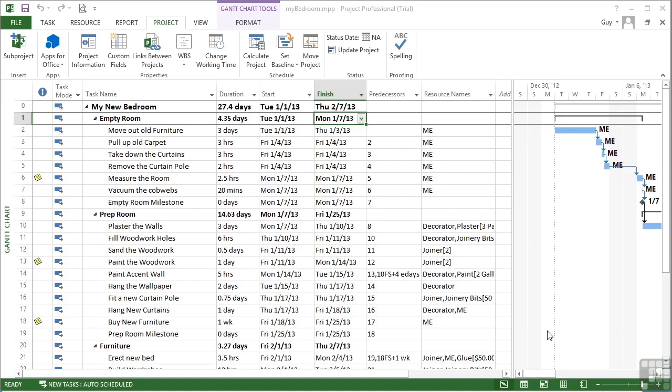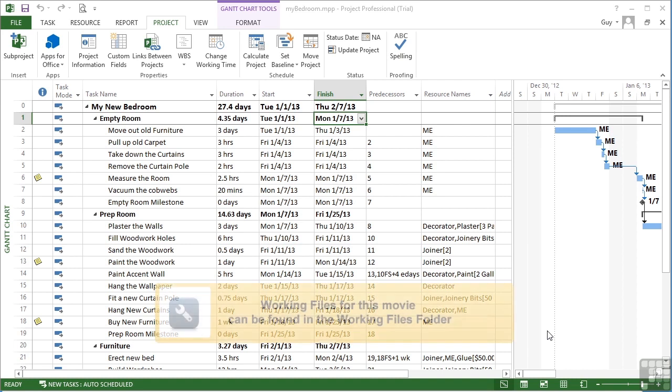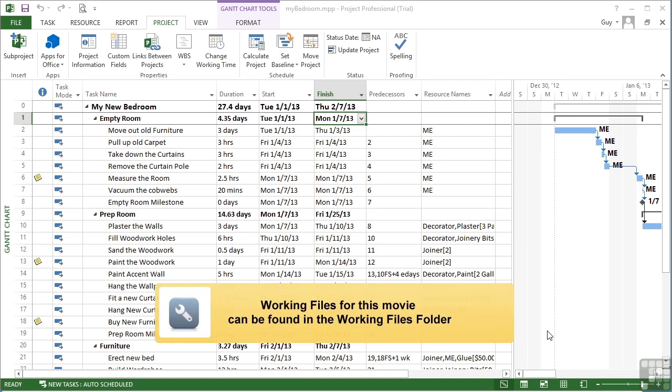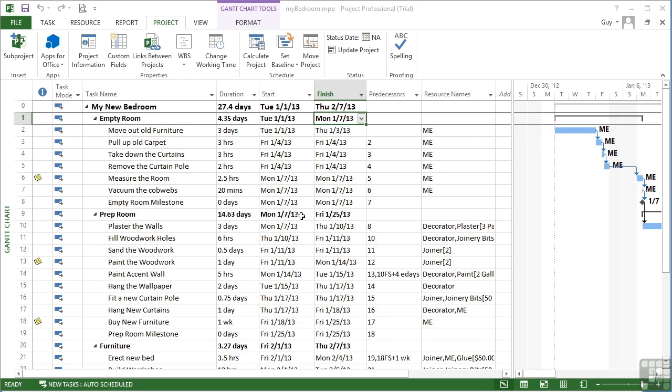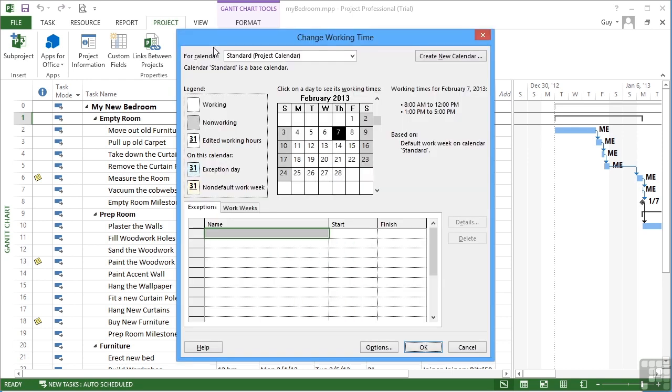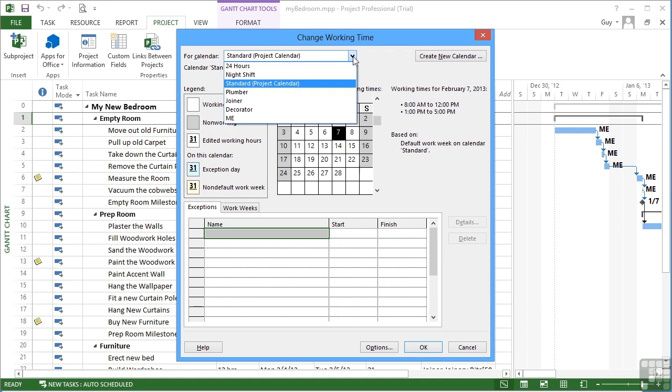The working pattern and availability for work is driven by the standard calendar that we've already explored, but each individual work resource also has its own calendar. This calendar can be accessed through the Project ribbon and Change Working Time, and then choose the appropriate calendar.